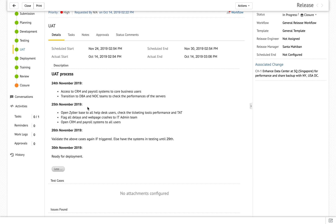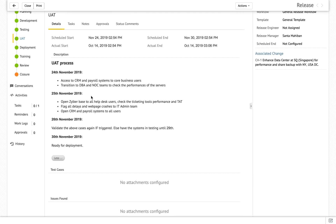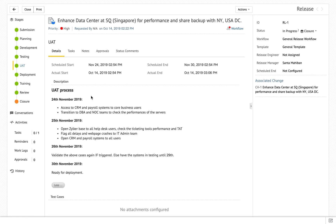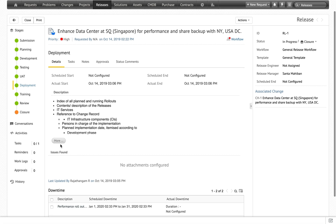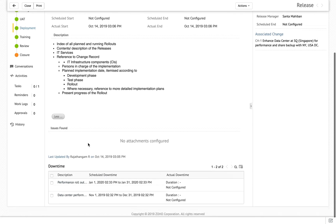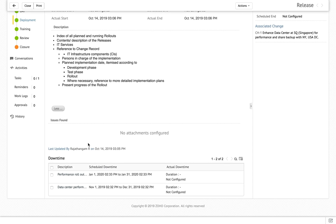Once testing is done, Zilker opens up to user acceptance testing, performing testing in a staged manner. Based on business needs, Zilker opens up their UAT for different sets of users to ensure load balancing, performance, and detection of any issues. Once user acceptance testing is done, it moves to deployment, where the entire plan on how deployment is to be carried out is listed and downtimes are carried forward to the deployment stage.